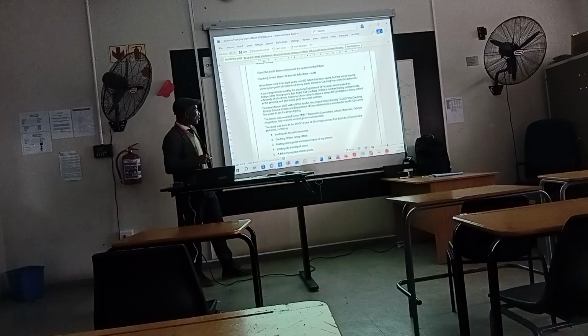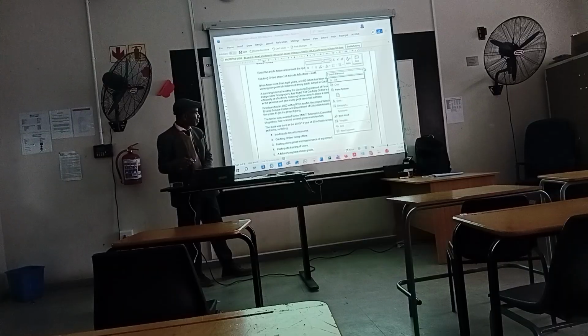The audit was done in the 2010 to 11 year at 50 schools across 5 districts. It found many problems, including inadequate security measures. These are the pitfalls: content online being offline every time, inadequate support and maintenance of equipment, inadequate training of users, failure to replace stolen goods.